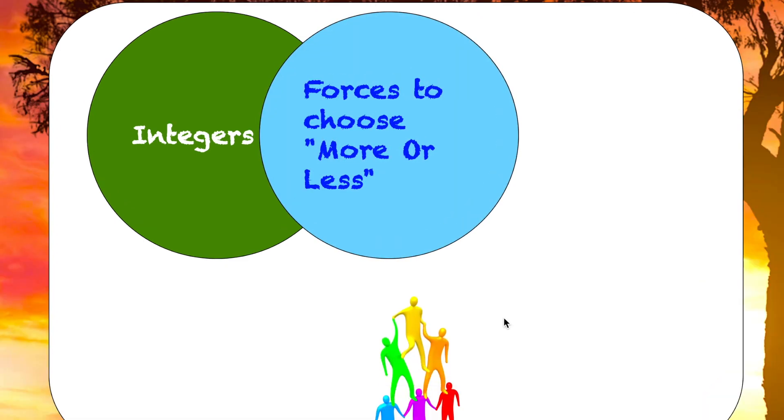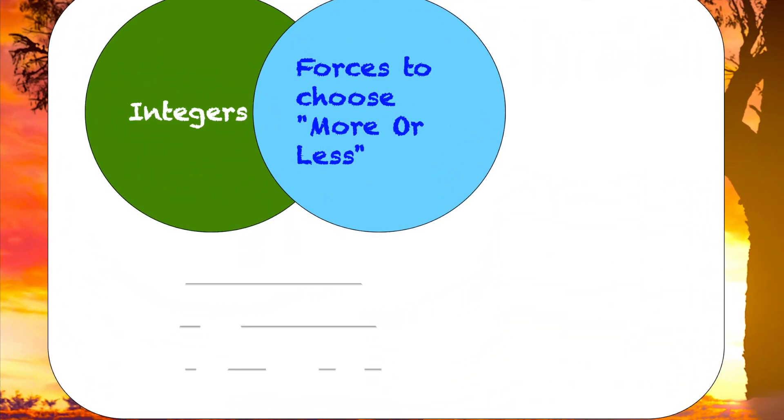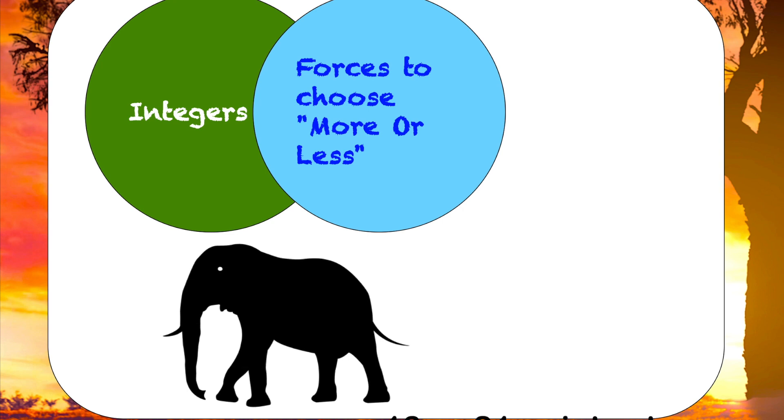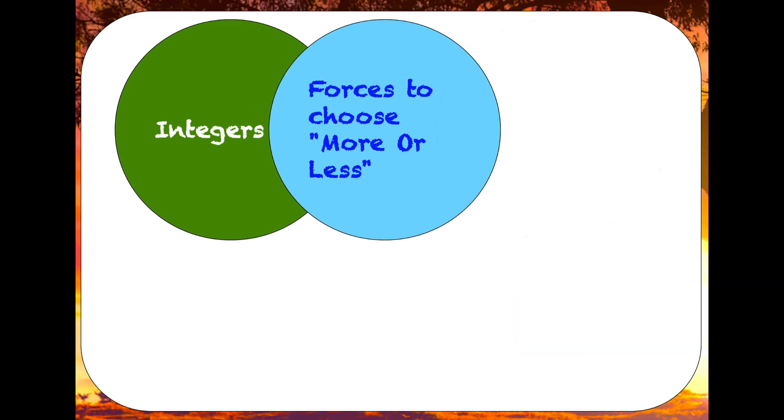Fibonacci sequence forces your team to make a choice, either more or less. When faced with a large task, it may be a 13 point story or 21 point story. There is no number in between. This helps your team to group and differentiate the size of the task.